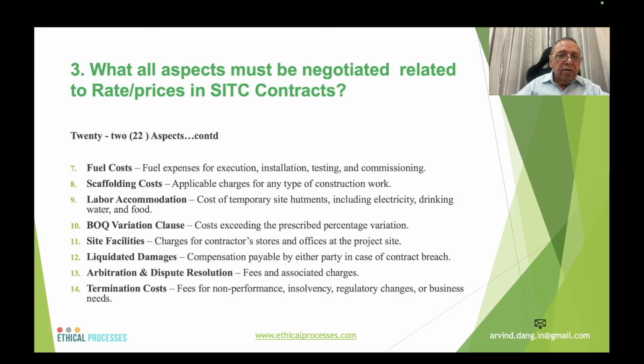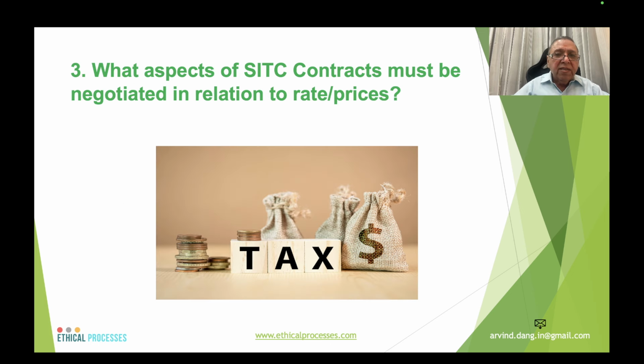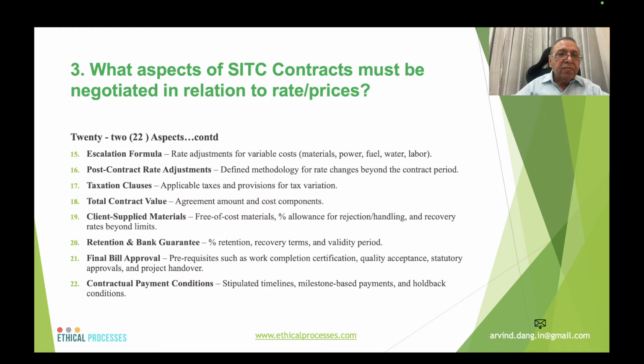Now, the other aspect is taxes. What all kinds of taxes are applicable in the case of such contracts? Now, escalation formula, rate adjustments for variable costs like materials, power, fuel, water, labor, indexes, post-contract rate adjustments, taxation, total contract value, what is the total value, client supplied material, what is the free of